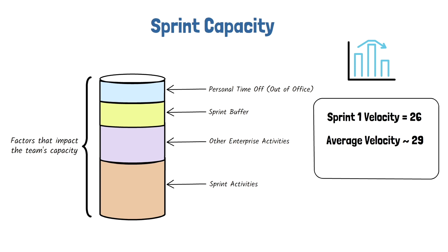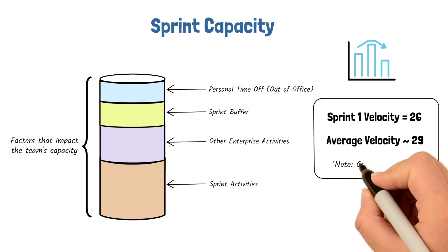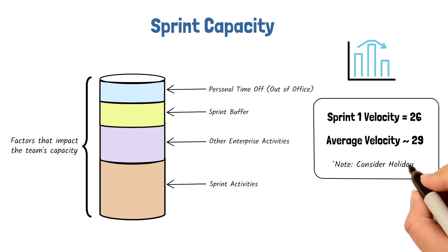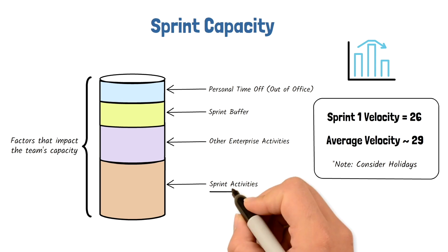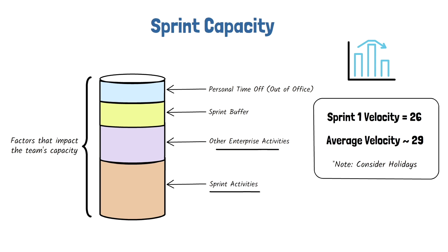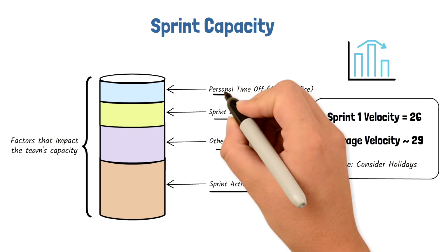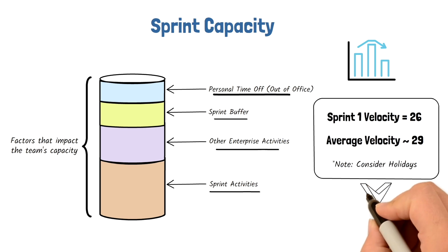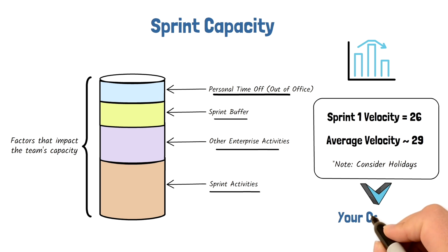If the future sprint is different from your last sprint, for example, maybe there's a big holiday like Christmas and New Year's, let's say that leaves us with 1 week out of the 2-week sprint. In this case, our capacity should be adjusted to half the story points. The idea here is to adjust the capacity in story points for the future sprints based on how the factors discussed change from sprint to sprint. Keep in mind the adjustment doesn't need to be perfect. Keep it high level and don't try to over-engineer. Every sprint you adjust based on your lessons learned.